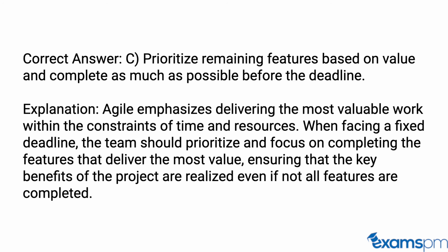Correct answer. C. Prioritize remaining features based on value and complete as much as possible before the deadline. Explanation. Agile emphasizes delivering the most valuable work within the constraints of time and resources. When facing a fixed deadline, the team should prioritize and focus on completing the features that deliver the most value, ensuring that the key benefits of the project are realized even if not all features are completed.